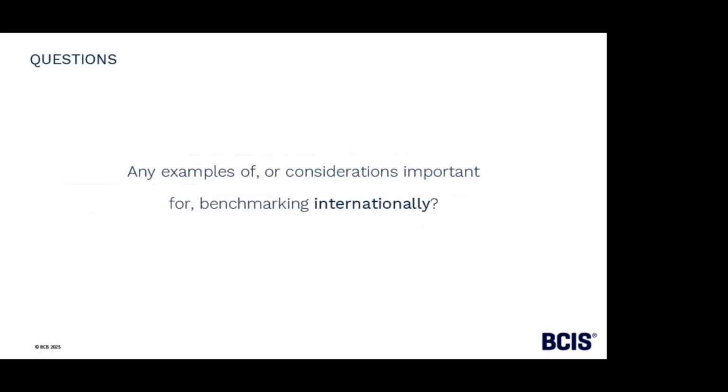Okay, next question. Any examples or considerations important for international benchmarking? Yes, we've done a lot of this. It's a whole webinar in itself. A gentle reminder on the quick-fire round. So for me, you've got issues with currency. You've got issues with very different standards. It depends what the purpose of the benchmarking activity is, but often you're not going to build the same thing in another country.